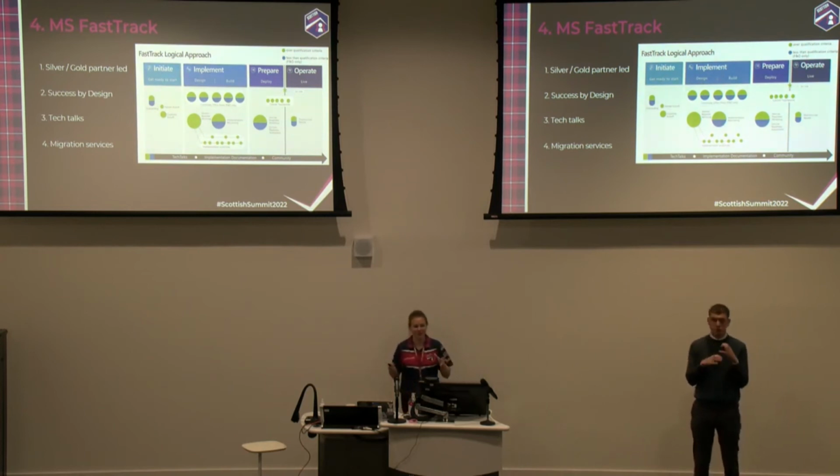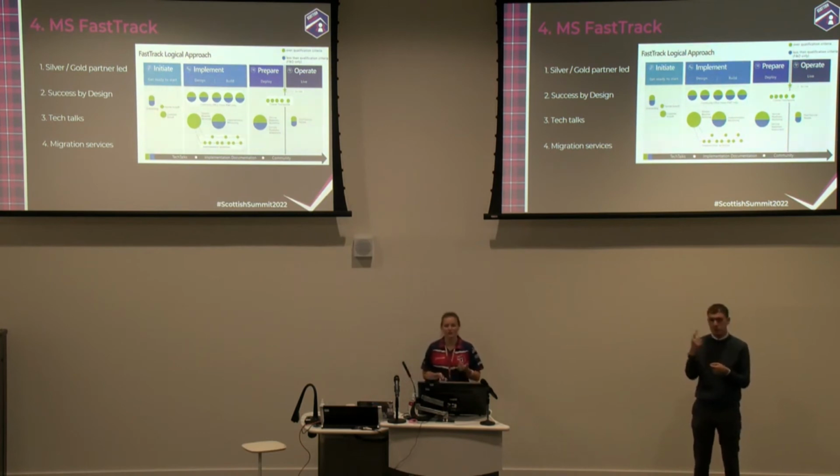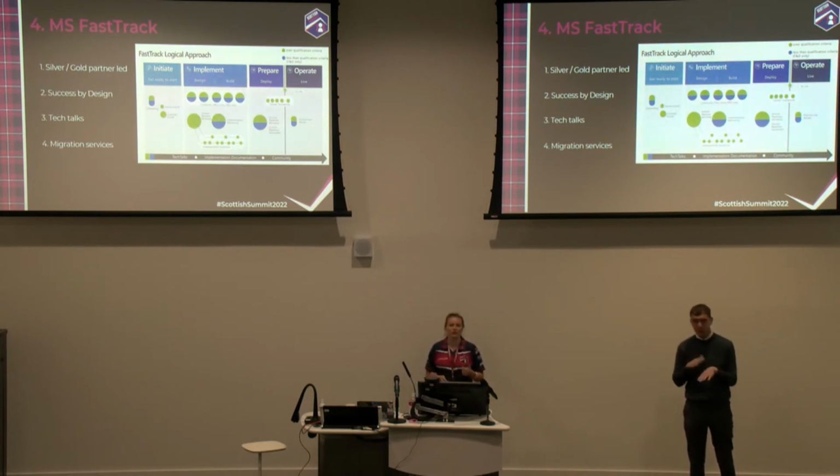Communication. They don't usually talk to each other. So when you have a partner, make sure that you know that the partner is also talking to Microsoft. Depending on the partner and depending on the person you get from Microsoft, that is not always the case. That is not a priority for them, to make sure that they keep themselves aligned. So that is also something that we got wrong. We assumed that they were talking to each other because they probably work together on more than just our project. But no, that didn't happen, and we found it out the hard way, halfway through the project, when we figured out we had to tell the same thing over and over again, twice or 3 times.